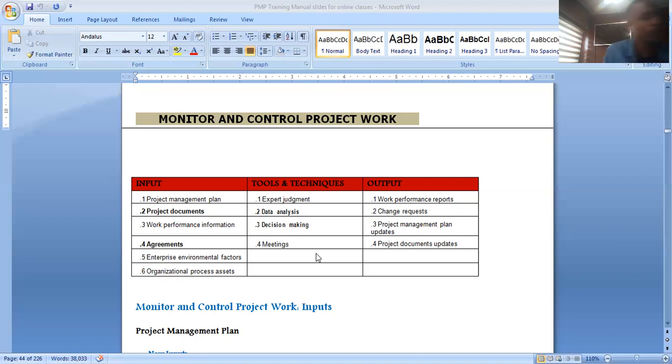Now let's move on to the integration change control. Change management system is very important. We have talked so much about the change management system, but you should know that change is an activity of its kind. Change is a process. And what is the very first process? If you identify something, report it. Tell us how it will save us money, save us time, save us quality, and have a better result. You have it written down.